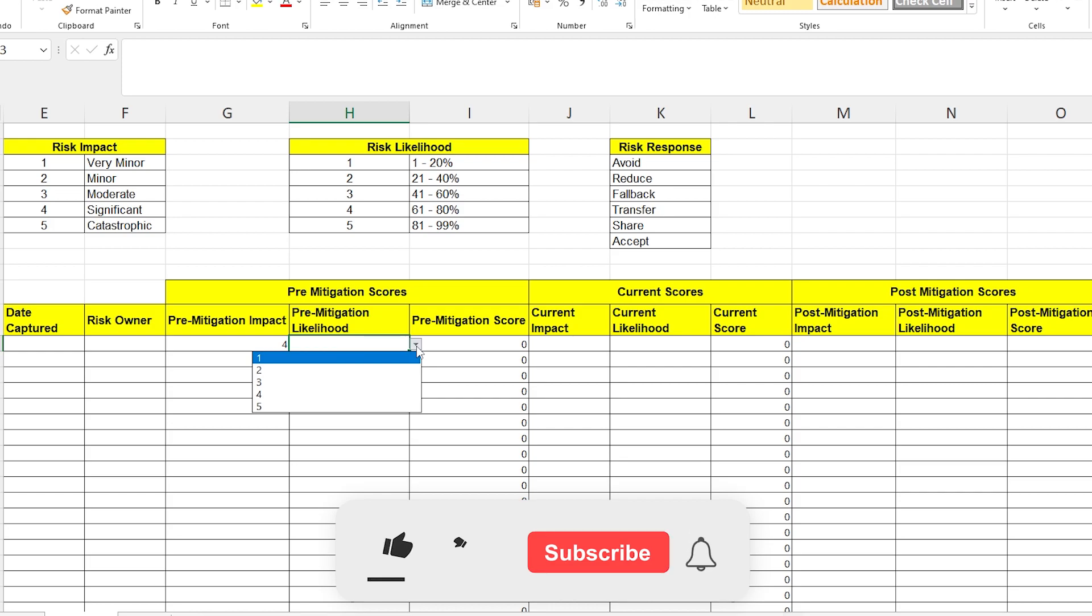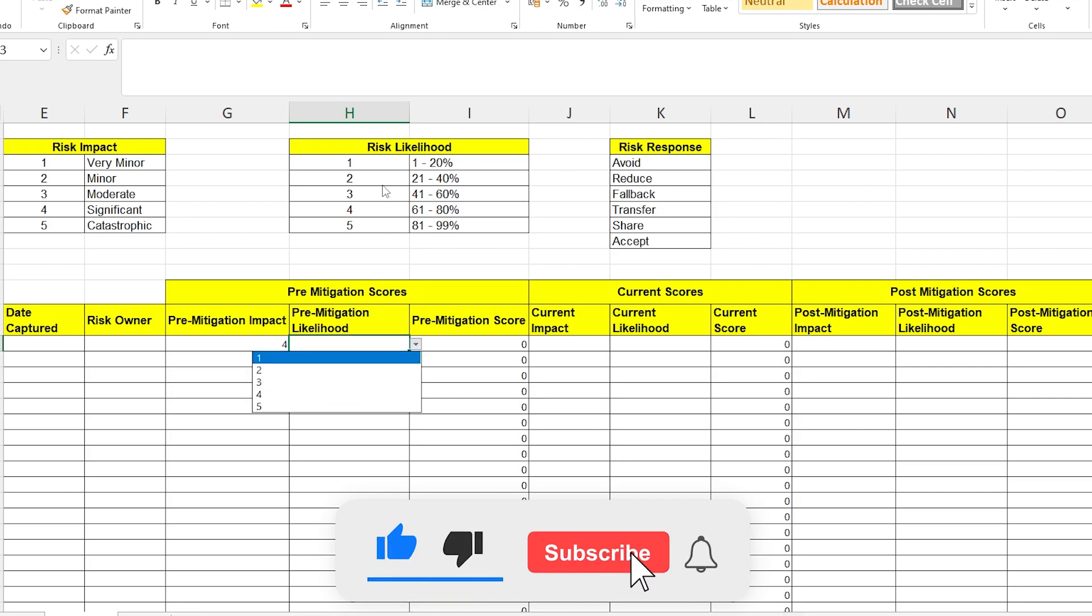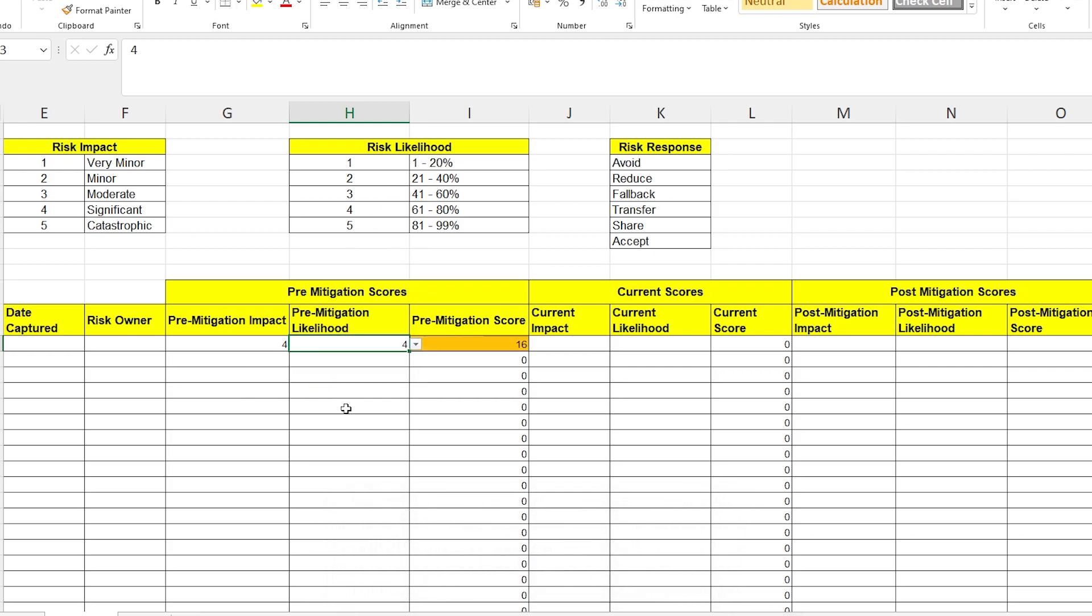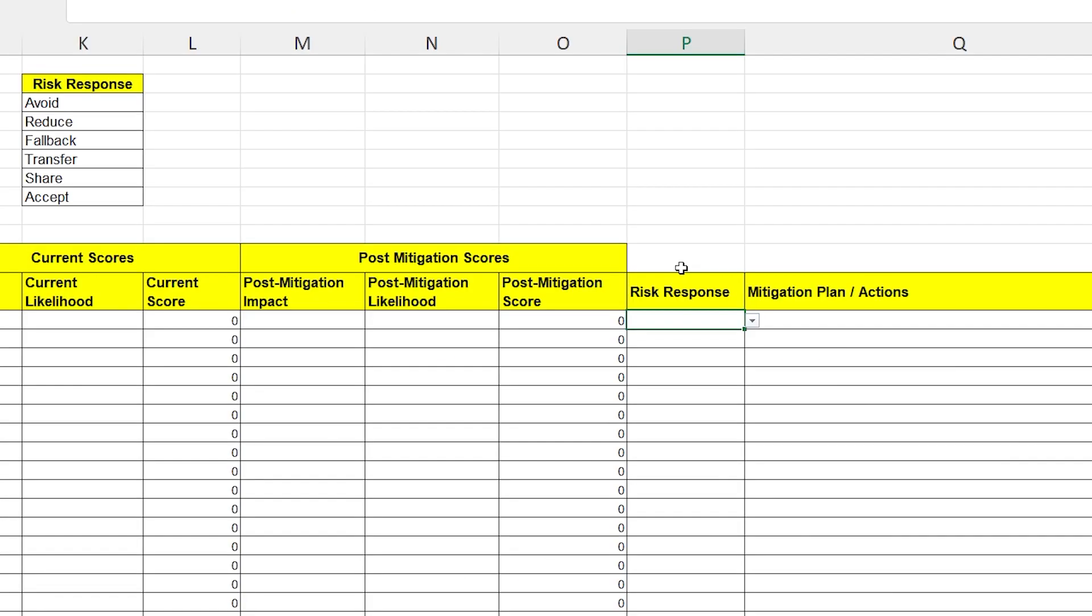Similarly, if you click onto one of these levels here for the likelihood, it's reflecting the values in this table. So, if you say, well, it's 4, this is quite a bad risk because it's significant and it's likely and that's why it's coming up as amber. These lookups and the conditional formatting are applied to the current scores and the post-mitigation scores and they're copied all the way down.